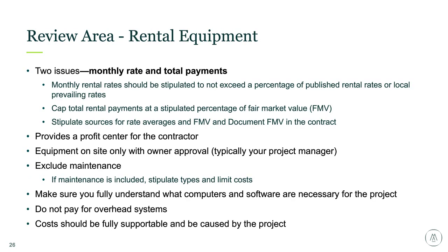Rental equipment, another area of high risk, specifically contractor-owned rental equipment. However, third-party rentals can pose substantial risk if the rental charges are in excess of the cost to purchase the equipment. Equipment needs should be well understood, and cost-benefit analysis should be performed in the planning stages to ensure that you're not paying for someone else to purchase and keep the equipment asset.